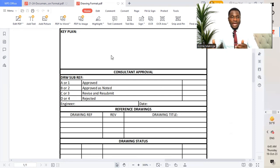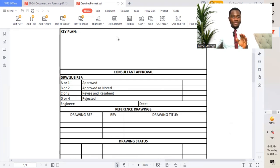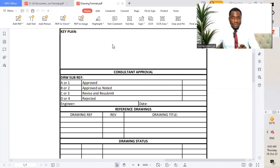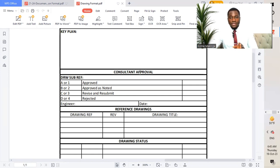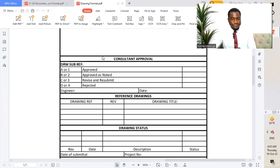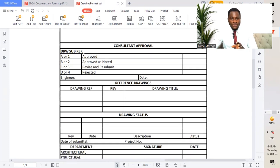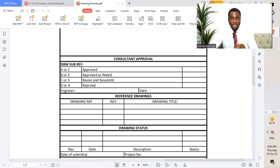For example, if we have different parts of drawings — part one, part two, part three, part four, part A, B, C, and D — when we put the key plan, it shows the whole total drawing and we highlight only the portion relevant to that sheet. For example, if the drawing is only for part A, we highlight only that particular part. The next section is consultant approval with drawing sub-reference codes: A or one, B or two, and so on.